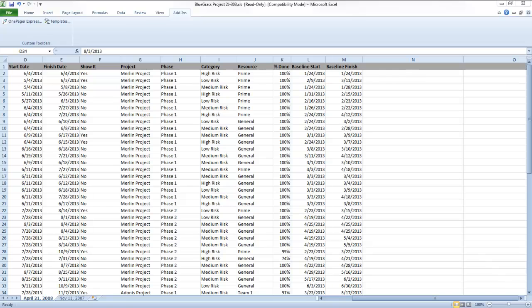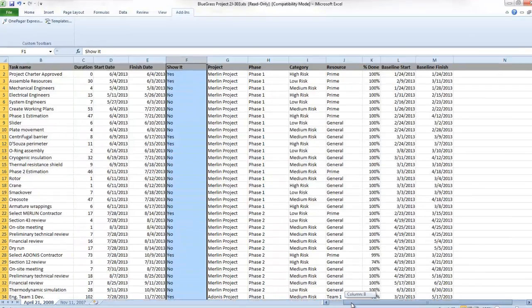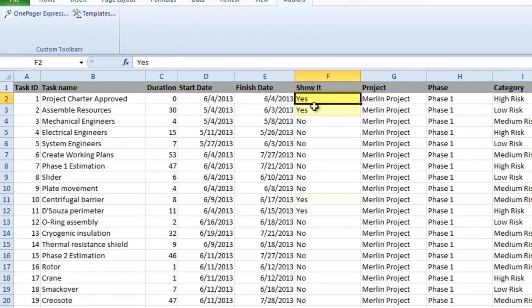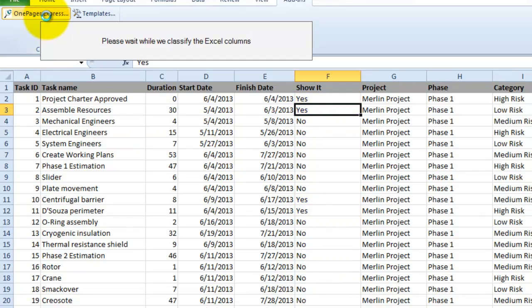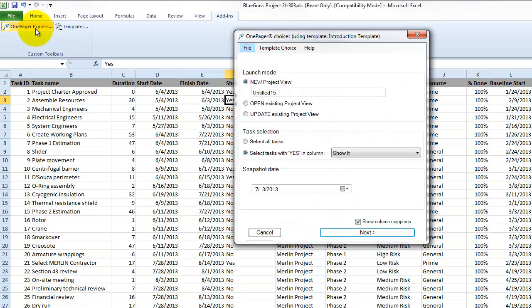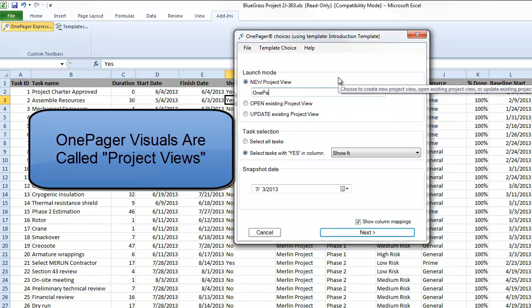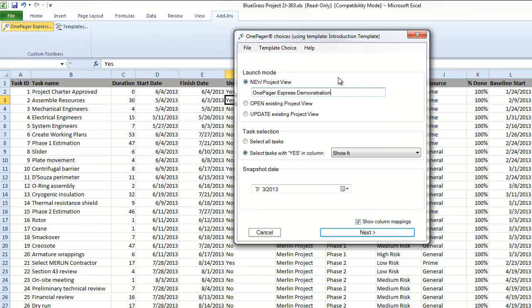After you've installed OnePager, you can create a visual by adding a column to your Excel document and then by changing the values in that column to Yes for the line items in your plan you want to present. Once you have your Yes values in place, you can launch the initial OnePager Choices form by clicking the OnePager Express button from Excel. We refer to the OnePager documents themselves as Project Views. Give your OnePager view a name, and then select the appropriate column where your Yes values are stored.